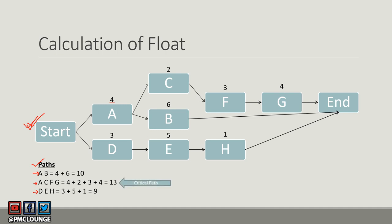We already know that ACFG is the critical path because its duration is the highest at 13. This was covered in our video on critical path. Now let's calculate float.